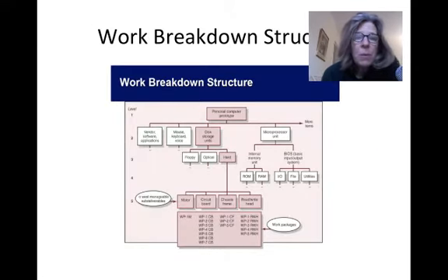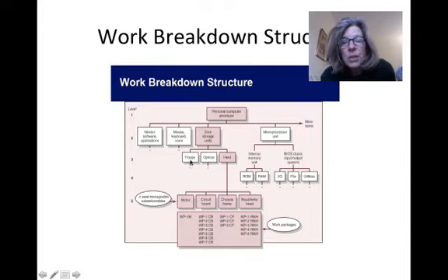It's an art. How are you going to determine what to break down? Here's an example of a work breakdown structure for a personal computer. What they did is break it down into all the different hardware specifications. They didn't include software on this, but they could have, because it says more. Software, keyboard, storage units, microprocessors, and maybe the mouse, etc. Under storage, it says floppy, optical, hard. Those are the 3 they want to be thinking about.